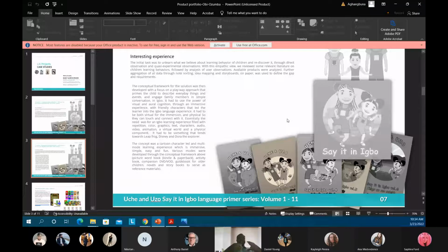We actually dialogued how to make a decision on anything, where to do a design freeze, where not to, and all of that. And then determining what extent of the job we could do and what part of it we could delegate out. Once we had these things set in place, it didn't stop the differences from coming up, but it resolved them because there was a way that was already agreed upon, which everyone was bound to. I mean, when I say everyone, only two people.